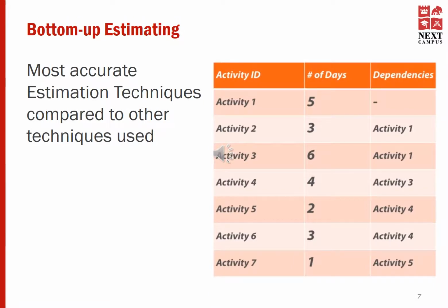To sum up, bottom-up estimating is the most accurate approach to estimate cost and duration. It also requires the most time. This kind of estimating involves the entire project team and gives them the opportunity to take part in developing the estimates used to measure their work. As a result, bottom-up estimating tends to develop a higher level of project team commitment than parametric estimating. In parametric estimating, where the numbers come from an outside source, like published rates, the team members may feel you have imposed the estimates on them. The drawback of the bottom-up approach, however, is that it takes more time than other estimating techniques.